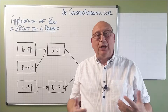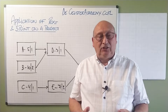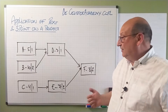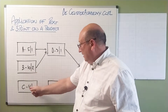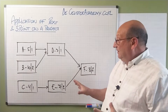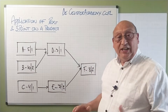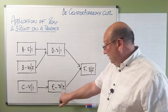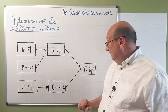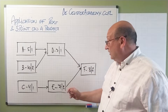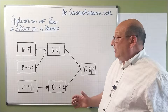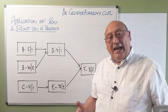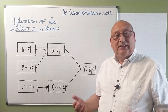In order to illustrate how we apply this to a project, I selected a very simple project which is composed of 6 activities: A, B, C, D, E, and F. This is the network diagram. A, B, and C have no predecessors. D has A and B as predecessors. E has C as a predecessor. And F has two predecessors, D and E. What we find here are two numbers: the first number is the expected duration of the activity, and the second number is the standard deviation.